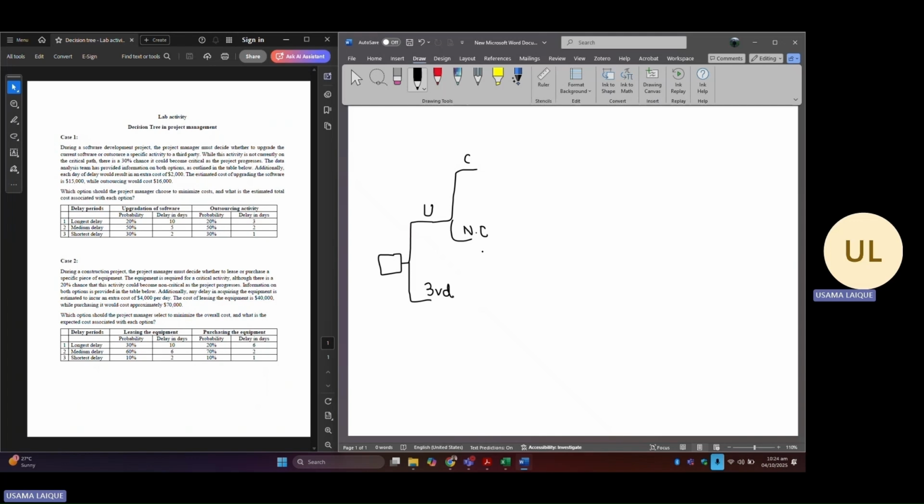Now, if the activity is non-critical, we are not interested in delays, since we talked in one of your lectures about the total float and the free float corresponding to a non-critical activity. We also got to know that for a critical activity, the total float and the free float are always zero. These are the activities which you can't delay anymore because they have a direct impact on the project completion time. So this means that if this activity becomes critical, then we are interested in three time